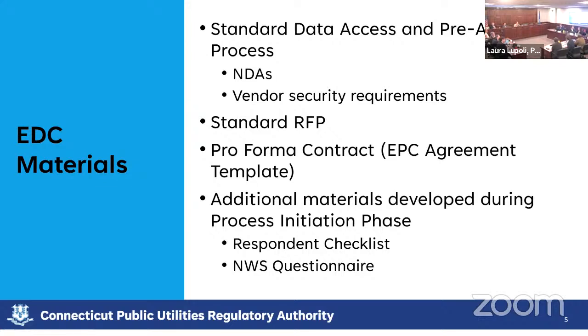We did comment on the EMV in our written comments, I believe, and the EMV plan will be within the developer's contract. However, it was not part of the pro forma contract because it's usually customized to the technology being proposed.